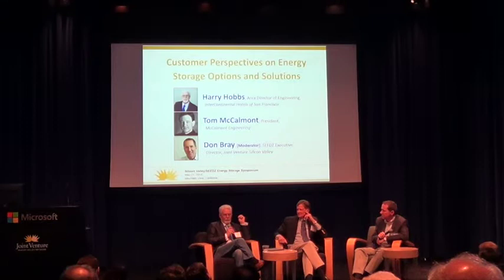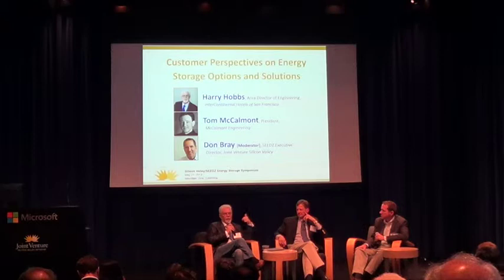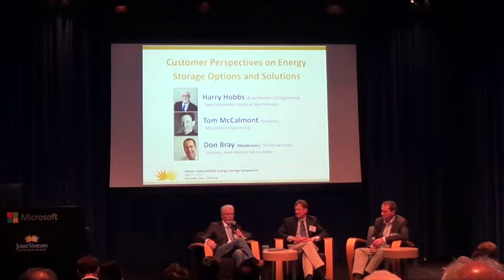We started off the first year. We opened the hotel in 2008, February 28th, actually. And I ran the building exactly the way it was given to me that first year, so we established a pretty strong baseline for making a case year over year. 11 months into that first year, I started working with Pacific Gas and Electric and many others who found me quite humorous, asking for a retrocommissioning project. And fortunately, at 11 months, we got that started. So our year over year, after retrocommissioning a brand new building in downtown San Francisco, built by very reputable people, we found a 16% savings in electricity and a 25% savings in natural gas, even at that young stage.